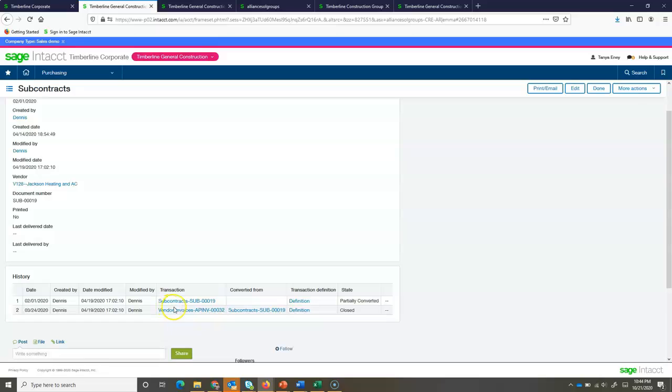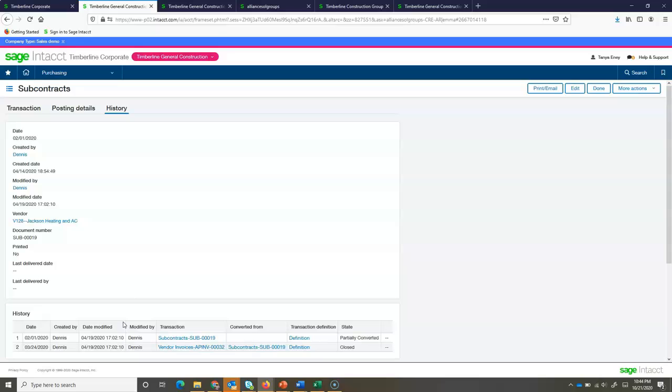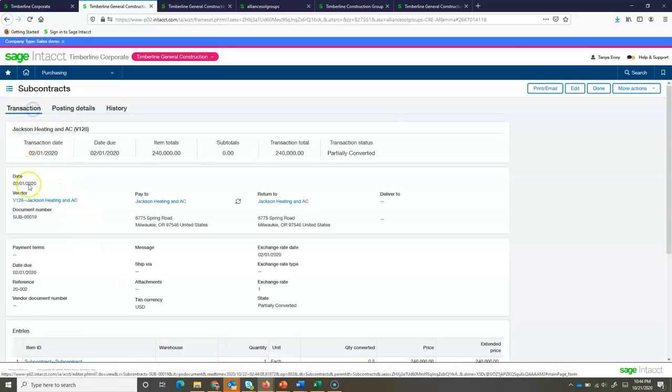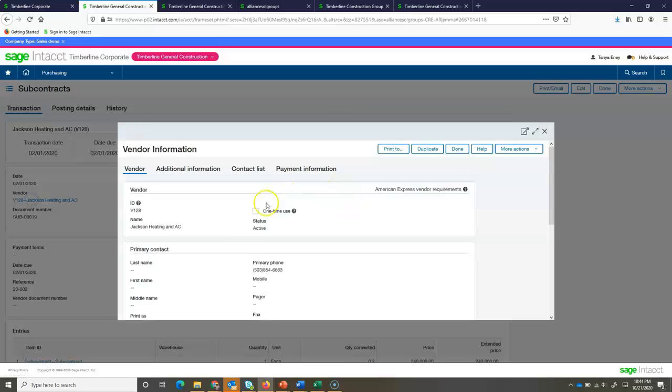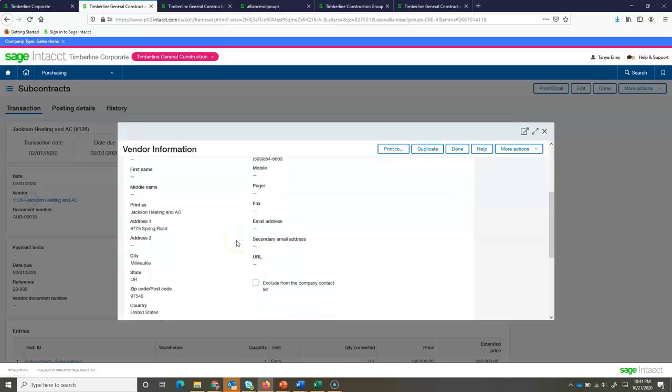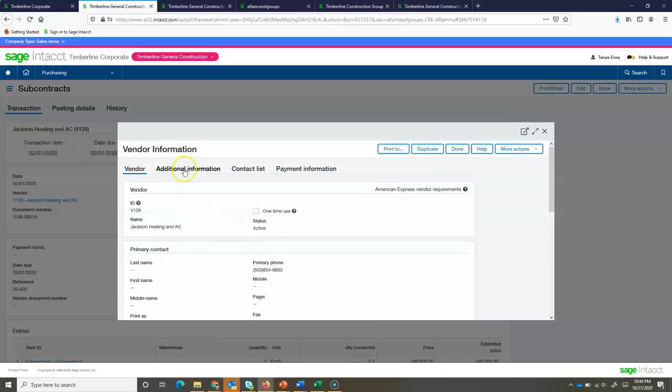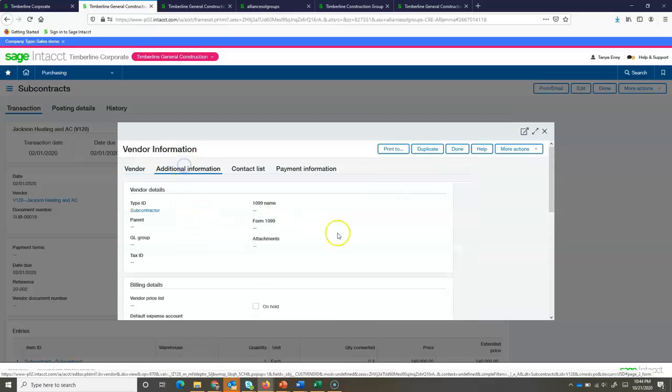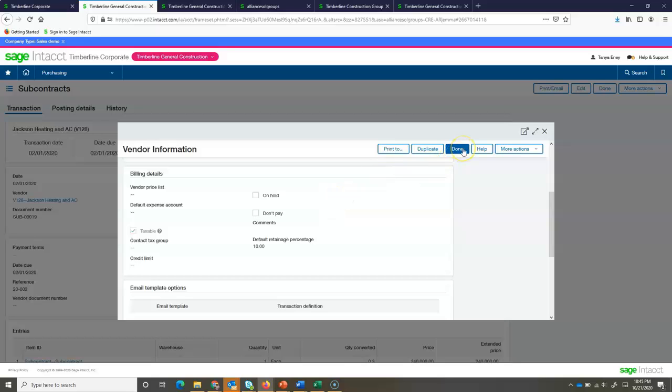Now, looking at the history, I see that we've already applied one invoice, so it's been partially converted. They did maybe they submitted a payment application to us, and so we've paid that or entered in a payable for a portion of this invoice. Now, if we drill into our vendor record, we can see some important details that would pertain to the construction. And that would be our retainage. So, here on my vendor screen is where I can set up what I want that retainage to default to deducting for this vendor.